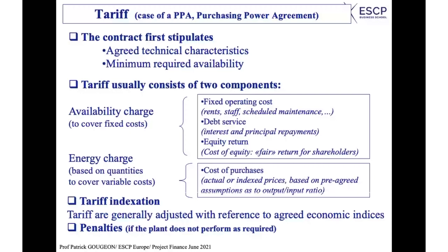Okay, so you see, with this type of PPA, it's a good example to explain how you can guarantee the revenue. Then, based on this, if you have such a PPA, assuming that the public entity is a reliable entity, if it's not, then you may cover your position with an insurance, political insurance, as we'll see later on.